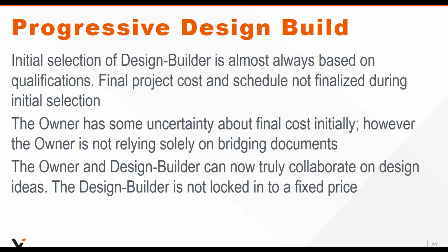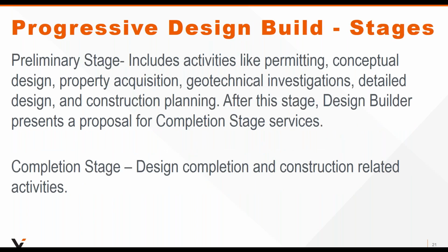And the idea is to get a partnership going. The owner doesn't know initially how much the final project cost is going to be. They haven't gone through the capital budgeting process. So there's some uncertainty there, but they do know they want something, and they don't want to rely solely on bridging documents. So during this phase, and the design builder is being paid for their time, obviously, there's no limits on the solutions. It's a collaborative process, and the design builder is not locked into a fixed price.